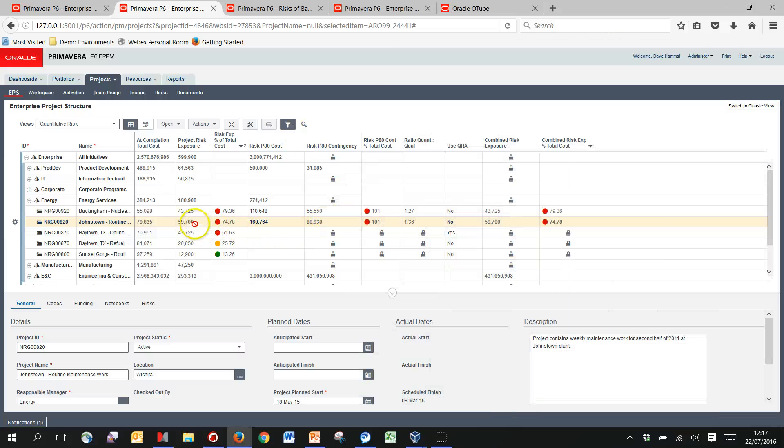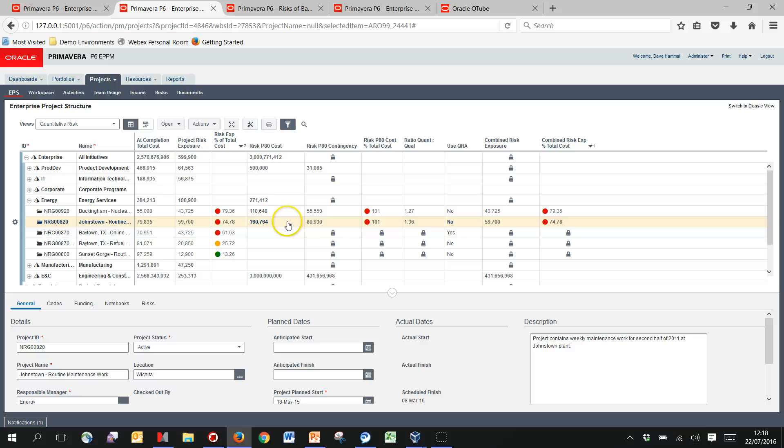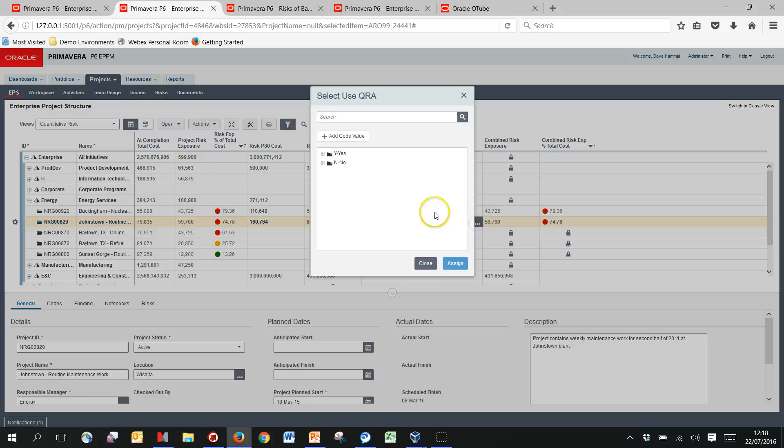And yeah, so we can see we've got our original based on the project risk exposure. We've now got, having run our quantitative analysis, we can see we've got a number that's a little bit higher. We've gone from roughly 60 to 80,000, or about a third higher as we can see on this ratio here. Then we've got the decision, okay, are we gonna go with that quantitative risk analysis? Maybe I might want to check my numbers and why I've got that little difference, but given that it's pretty small, I might say okay yeah, I'm gonna happily use my quantitative risk analysis piece in here now.